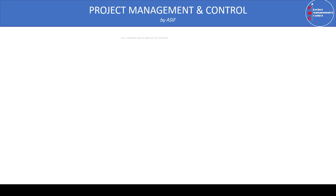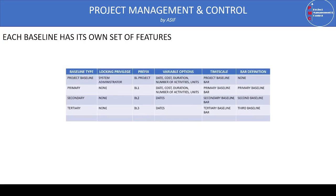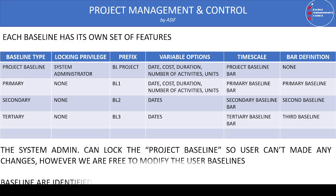As you can see in the table, there are four baseline types: project baseline, primary, secondary, and tertiary baseline. The project baseline has the privilege that only the system administrator can lock it, meaning regular users do not have authority to make changes to the project baseline. However, users can make changes to the primary, secondary, and tertiary baselines. When you assign a project as a baseline, P6 automatically provides a prefix: project baseline is labeled with 'BL Project' at the end of the project name.